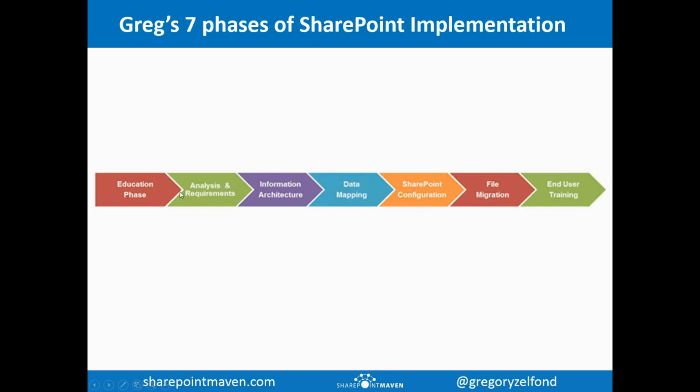You're pretty much going to be repeating these phases on different sites you implement. And the reason for that, as it will become evident as I go through the phases, is that each site has different users, employees, different owners. So you really have to repeat all the steps, because each of the sites will have its own unique requirements, data to migrate, etc.